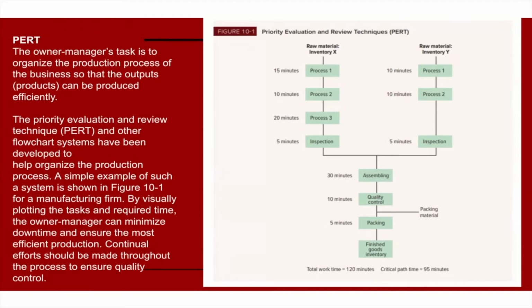Now, the critical thing of what PERT does is it not only lays out the process for individual components, so they can be done what's called in parallel. So we can do the buttons. If we say this is button manufacturing or button work, it can be done in parallel with the cutting work for the shirts. These are brought together here where they're assembled.